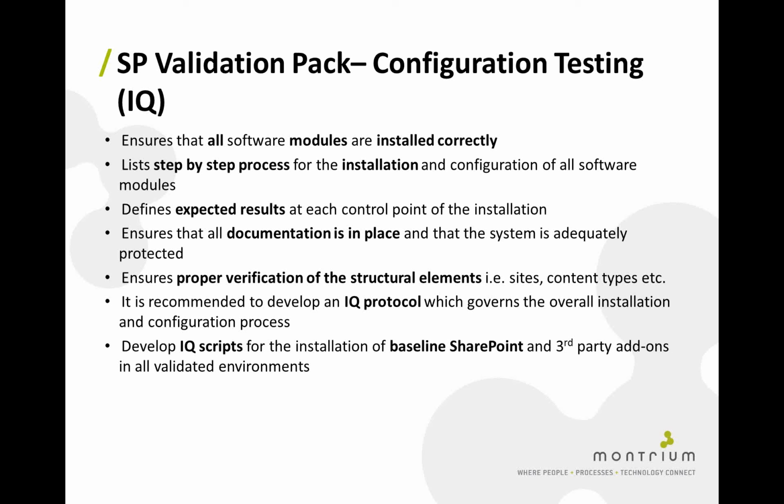Within the scripts, we'll actually have step-by-step instructions on how to actually install the software, as well as the expected results. We'll also use this to record all of the parameters that we've used during installation. This allows us also to ensure the proper verification of all of the structural elements using our configuration specification, so the QC of the configuration. And it's strongly recommended that you develop an IQ protocol as well, which explains how the IQ should be executed, both for the overall installation of SharePoint as well as the SharePoint configuration process.